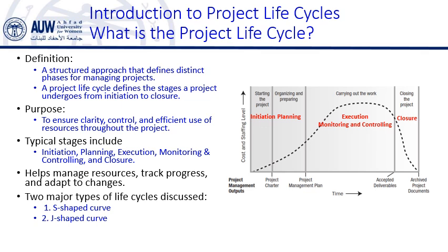The J-shaped life cycle, on the other hand, demonstrates a slow start with minimal progress in the early stages and a sharp rise in activity as the project nears completion. This is typical in research and development projects where breakthroughs often come later. We are going to understand each of those life cycle patterns in more detail.